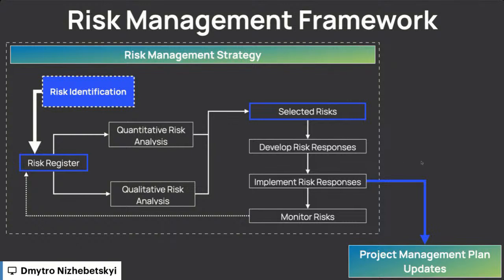And you see this big line that says project management plan update. What does it mean? It means exactly that your risk management efforts should end up in your Jira instance as tasks, as additional time buffers. Think about time reserves as an empty task that says, if this risk happens, then we'll need these 2 days of work during our sprint to tackle it. Otherwise, we may take some defects or extra work for those 2 days if the risk doesn't happen. That's how it works.